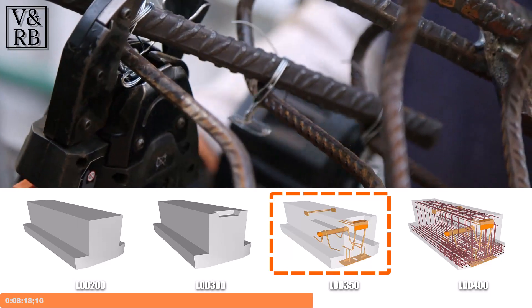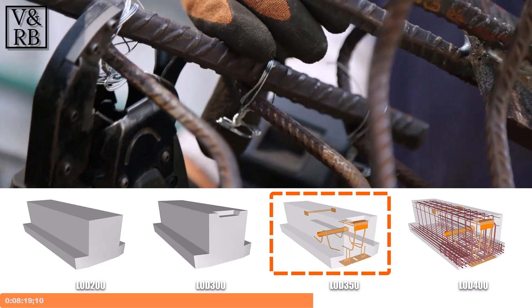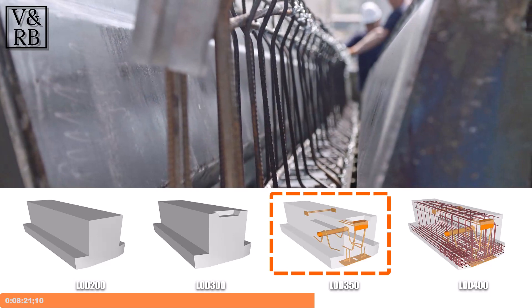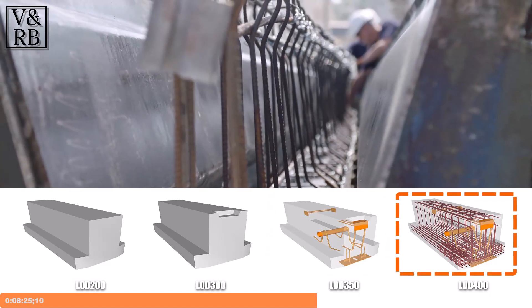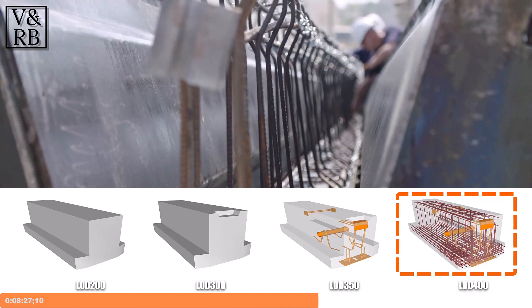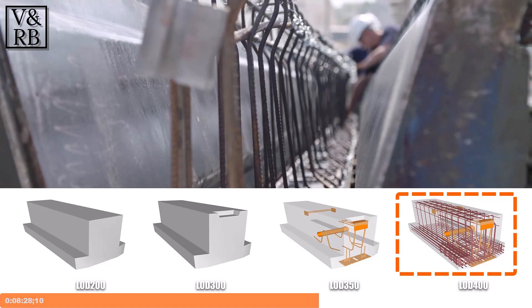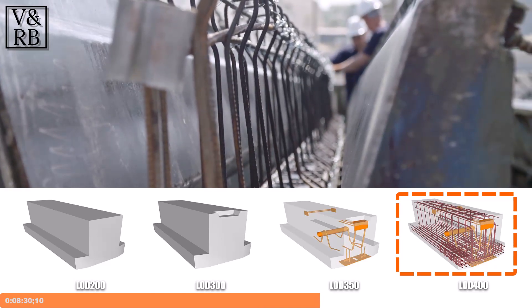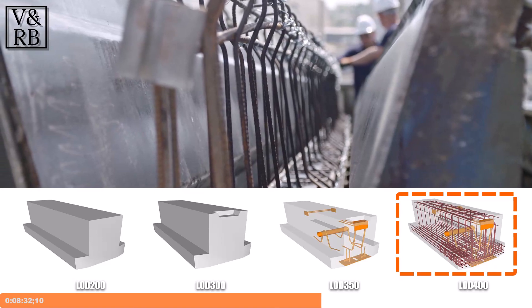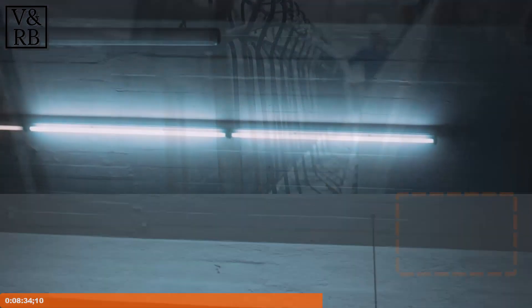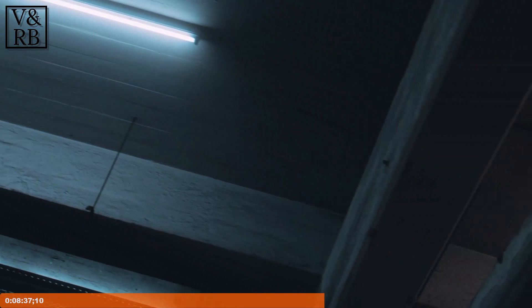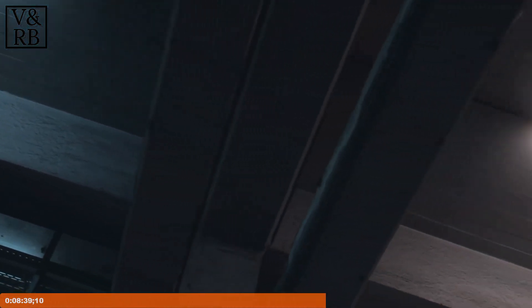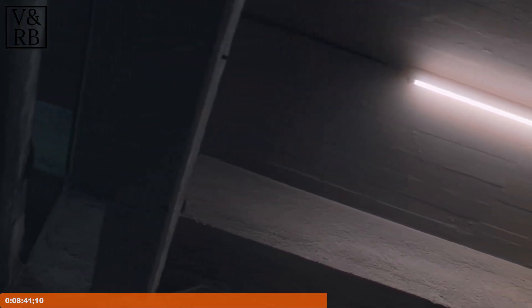Critical structural zones, such as areas that cannot be penetrated, cut, or damaged, are also modeled. LOD 400 represents fabrication level information and includes all reinforcement, including post-tensioned elements detailed and modeled with cambers. LOD 500 represents the as-built state of the project, and allows for a digital twin deliverable for management during facility operations.